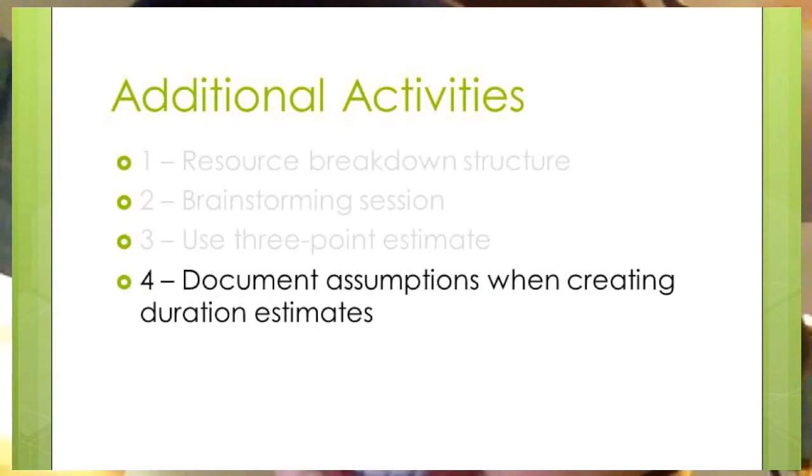The other activity we could add is documenting assumptions when creating these estimates. When creating estimates, it is important to document them so in the future they can be reviewed and see how accurate they were and how likely the project members are to hit their assumed estimate. Duration and effort are related, so this gives insight into any problem areas where team members may not be performing optimally.